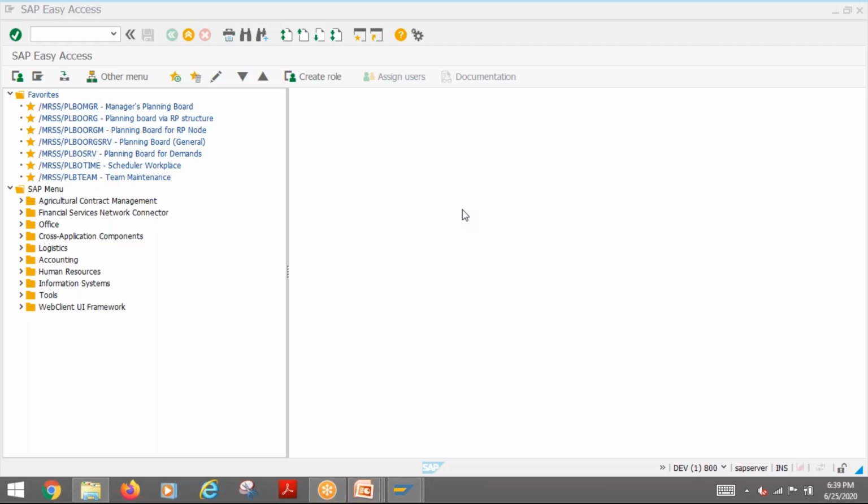So whenever you are doing the network costing, what you need to consider is to schedule, or you can say list down, all the resources required for the activity. First, obviously, you have to prepare a schedule based on the list of activities, making them into a precedence table and putting in the dependencies. After that, you can plan your resources, put the resources there, and the system will automatically calculate the cost, and the duration or period will also be automatically taken care of based on the period of the activity.